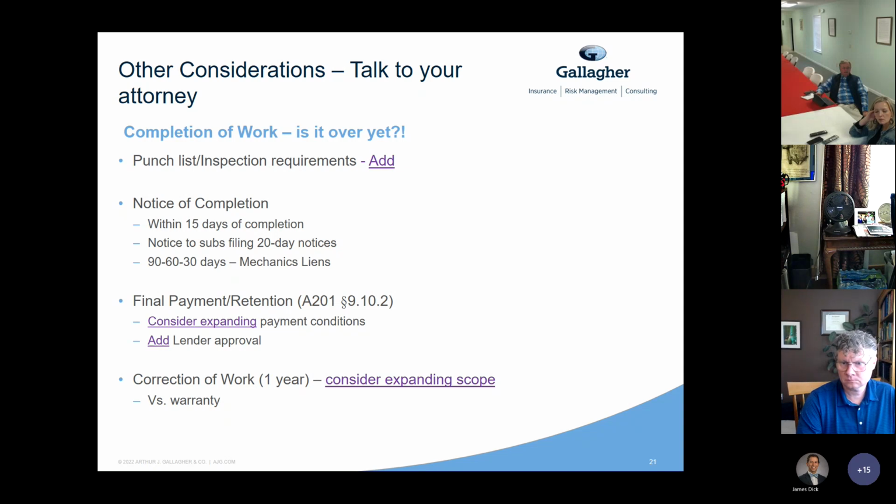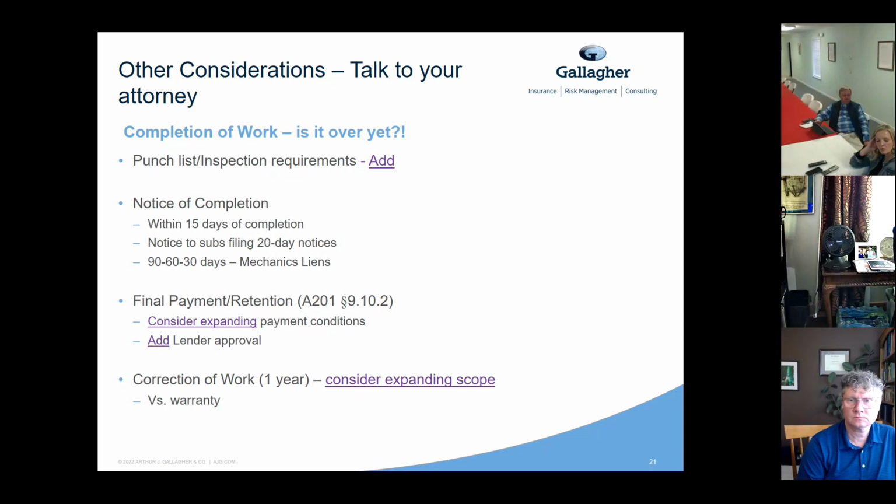Anyone who's done a construction project, whether for their own personal home or for the organization, probably knows it's a lot easier to get the contractor to do the work before the notice of completion is done versus afterwards in working with the warranty team. So you want to make sure that this contract gives you that opportunity to look through the building before the notice of completion is issued, and that you can get repairs done before that's issued.